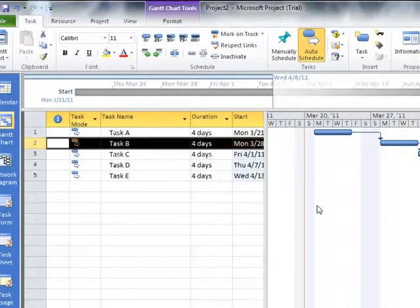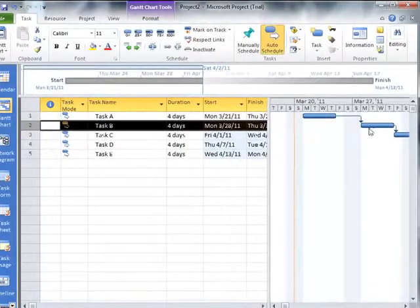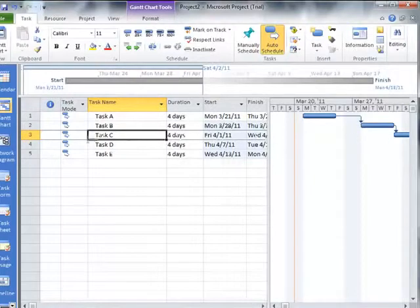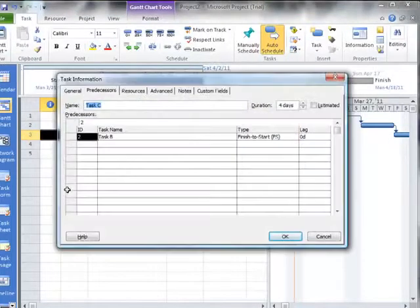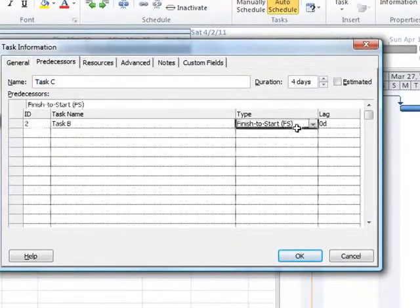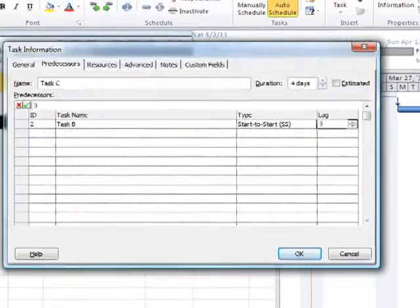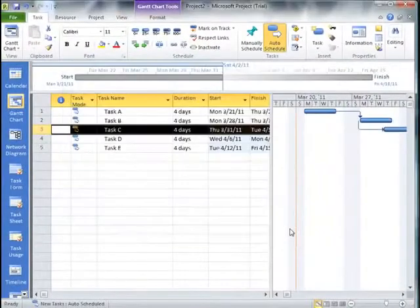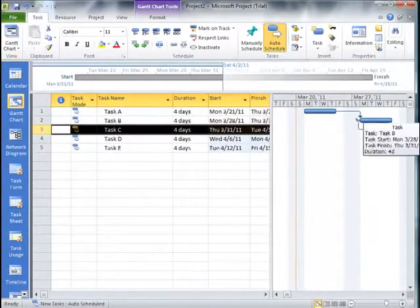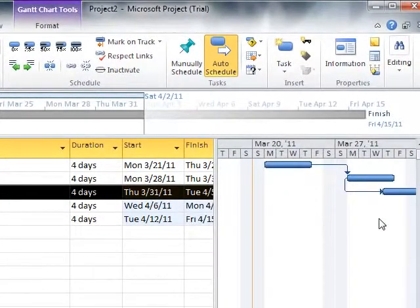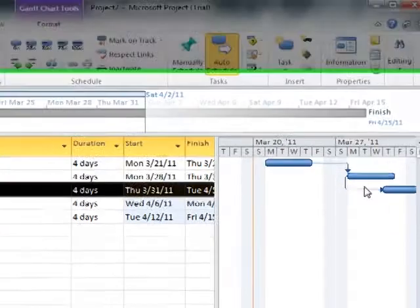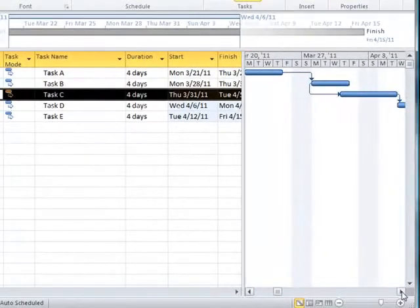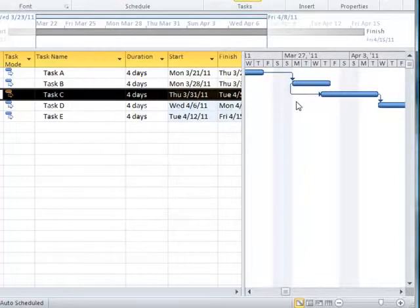Let's look at another one of these tasks and enter another type of lag. Let's say that Task C could actually start three days after Task B starts. So what we can do here is we look at the relationship on Task C, and we're going to change that to a start to start relationship with a lag of three days. Notice what that looks like. There's now a relationship from the start of Task B to the start of Task C, and we have a lag time of three days built into this relationship. It should be a little bit more clear, and it certainly is represented well in the Gantt chart.